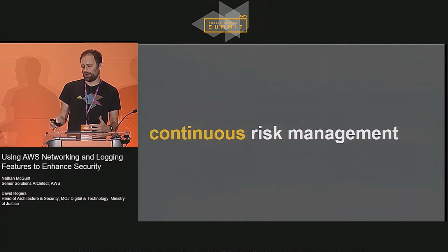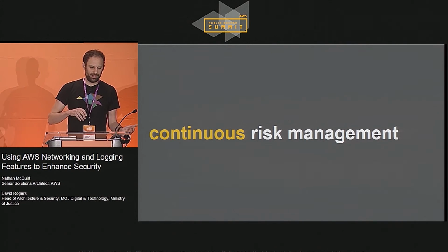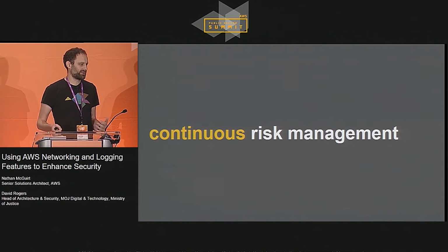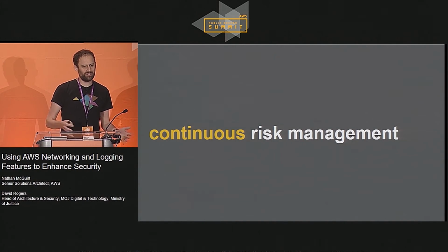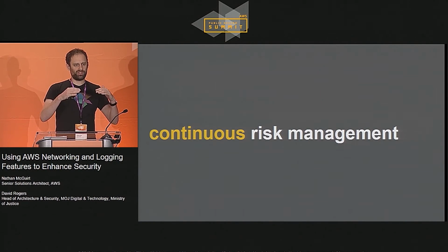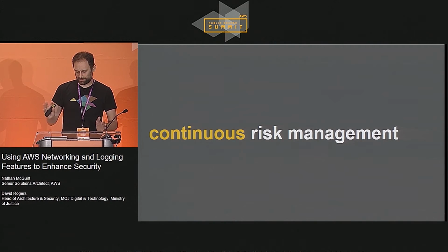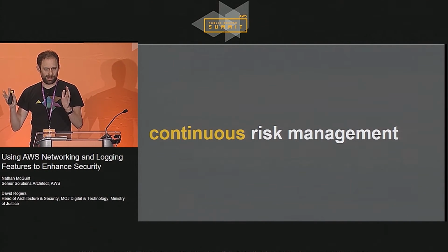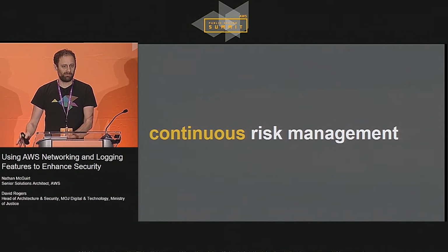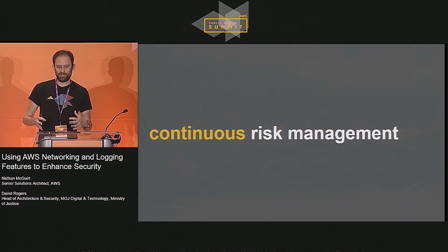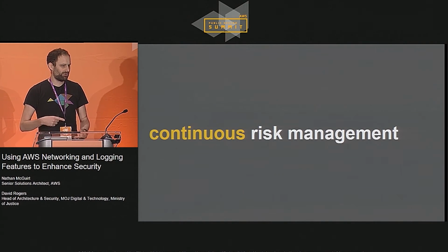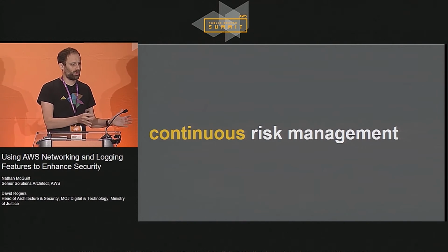So with risk management, what we're doing at the Ministry of Justice is we're using many techniques, maybe about 50 different techniques to assess risk. So that's both identifying risk and mitigating risk. And you layer those different techniques on top of each other. One might be as simple as a very simple checklist that a Scrum team will use every time they complete a story. It might be something that the team runs every sprint. It might be something a little bit more deep and analytical that you run maybe every single crucial architectural turning point.